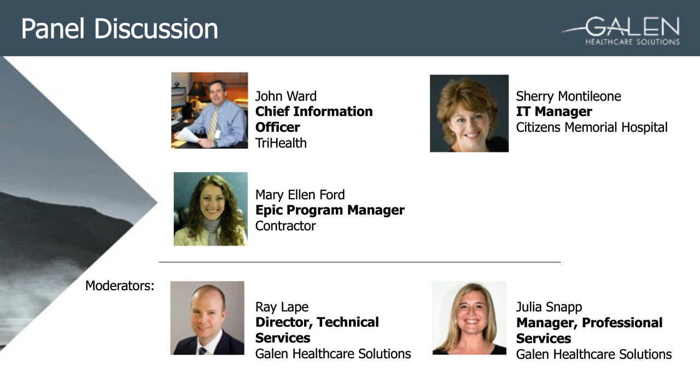In addition to my conversions team lead who loaded the converted data, we also included the EPIC ambulatory analyst, who is a really key person to have working on those. She serves as the liaison between the EPIC team who may be building it and those validators who actually know the data really well. She served a really important role in that mapping process. She was always on those weekly calls, and if she wasn't, we would reschedule because we wouldn't get very far without that particular analyst.